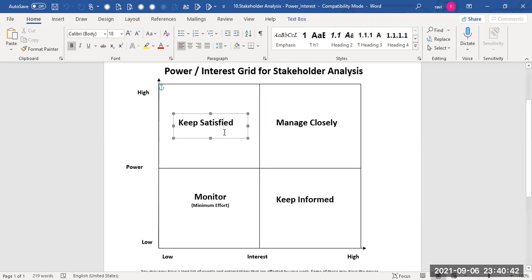We'll discuss this in more detail when we look at the technique, but this is something you need to do when you join a project. Plot each of the stakeholders into one of these 4 quadrants and design a strategy for each of them. This is also useful when somebody asks what you do as a BA when you join a new project.